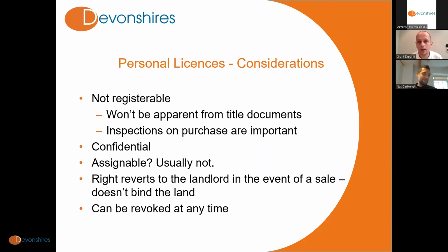It's worth noting that these are not registrable. Licenses don't grant an interest in land, so you wouldn't be able to register them at the land registry. In practical terms, that can be an advantage, but it does mean that if you're buying a property, it won't be apparent from title documents that a license is in place. Which makes it doubly important that a physical inspection is carried out of the property to be able to see if there is anything obvious on the ground that would suggest that some certain right is being exercised.